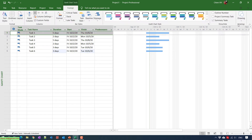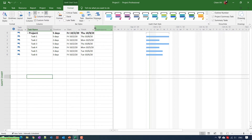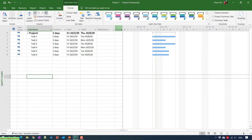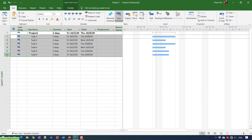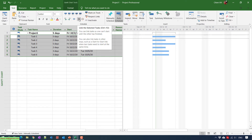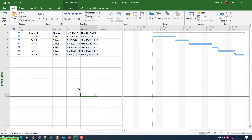Let me add the project summary task. The next step is adding the task links for each task in this project. The six tasks will be finished sequentially, so just select all six tasks, click on the Task tab on the menu, navigate to the Schedule section, and click Link Selected Tasks. You can now see in the Gantt chart there are sequential activities.